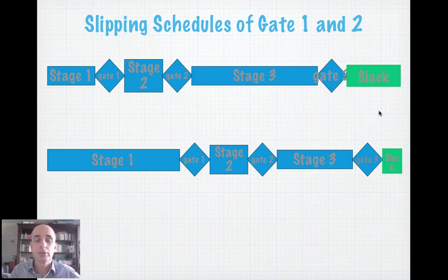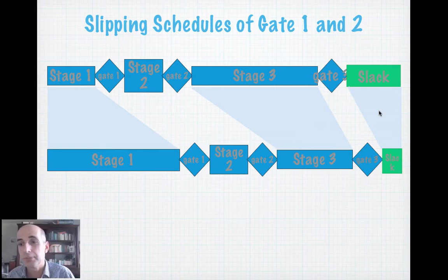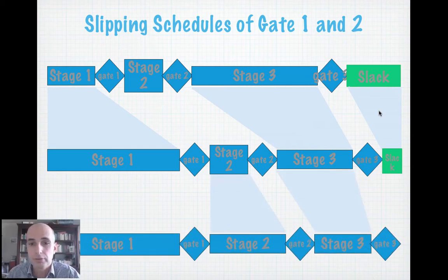Another way to visualize this is like this. So the top line is the original planning. The second line is the planning, performance up to stage 1, and you see that stage 1 has lasted much longer. And the idea is then in the planning, you know what, we'll do stage 2 in much less time, and certainly stage 3 in far less time. We can do this. So yes, we're late now, but we will be much less late later on. You may remind yourself of the Kahneman and Tversky planning fallacy, also decision trap almost of chapter 3. So being very optimistic about the future, and it got worse because then stage 2 lasts much longer, and then stage 3 is assumed to be done in half the time that it originally was assumed to be done, with quite some more work on top of it. And that simply didn't work.